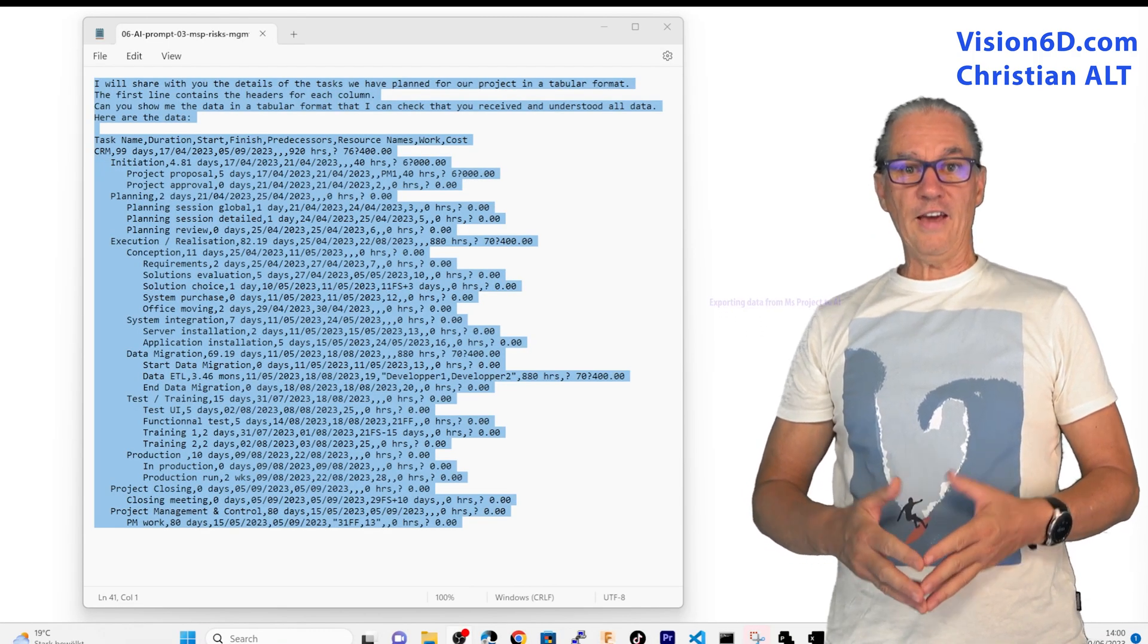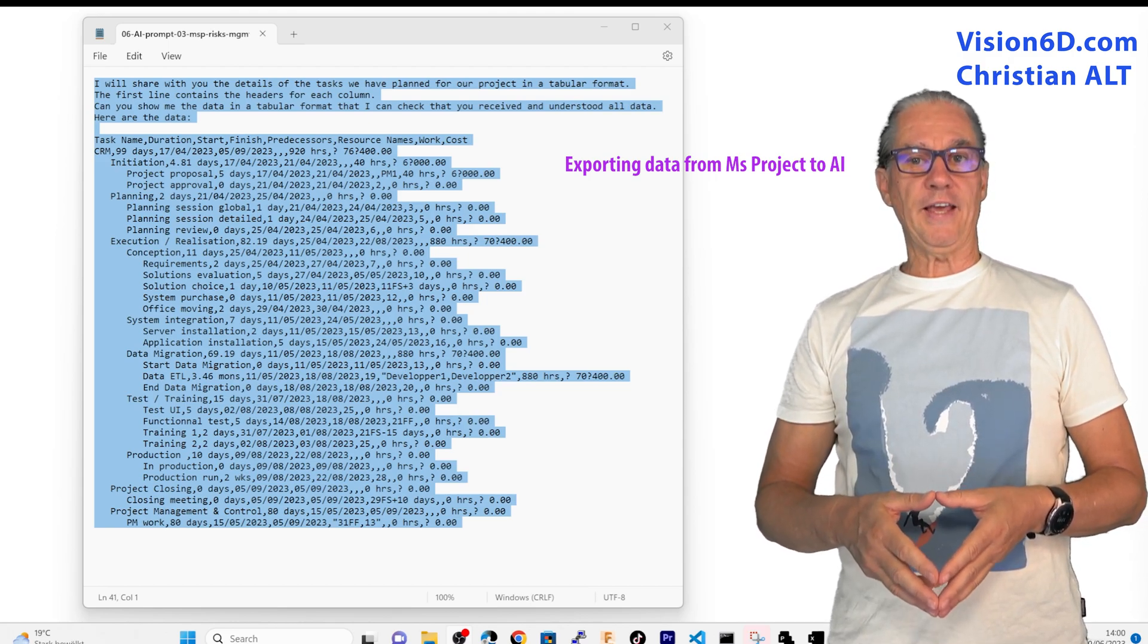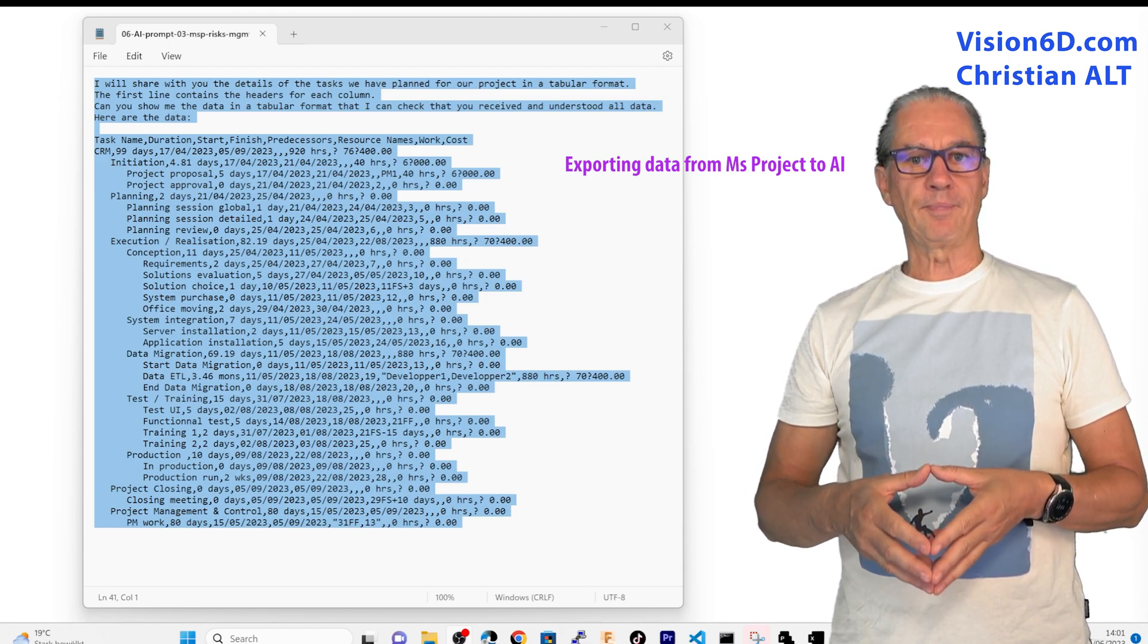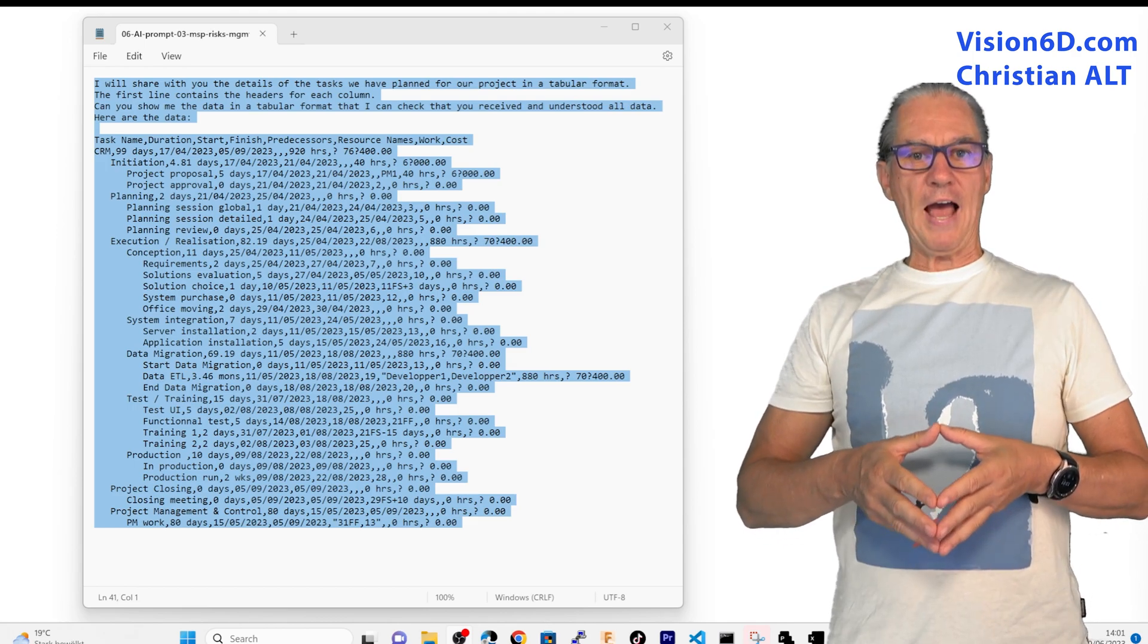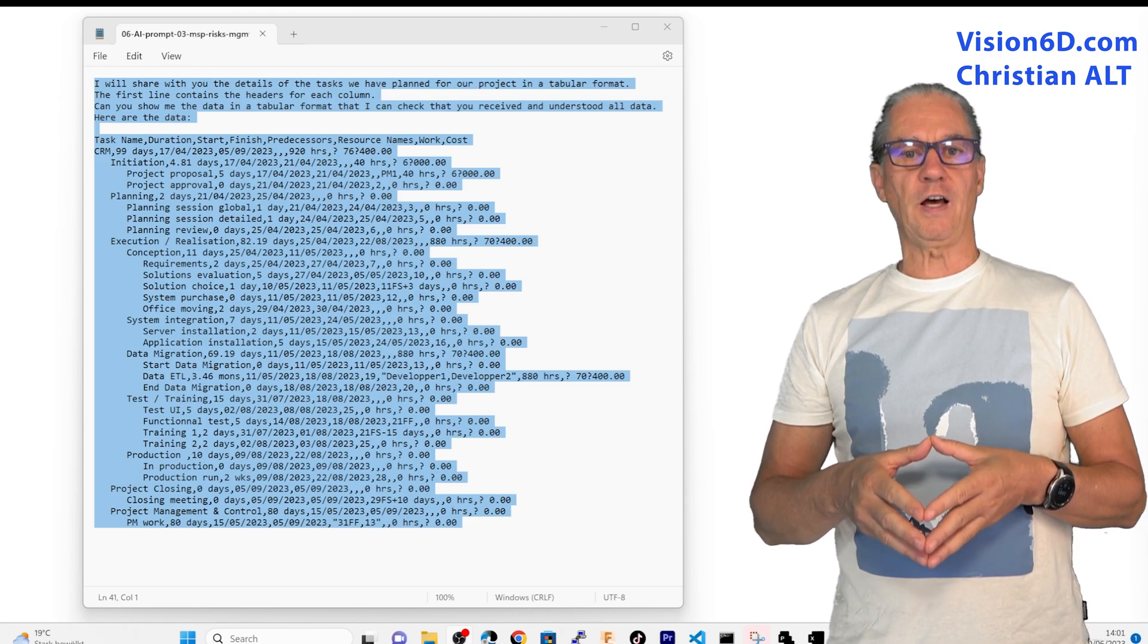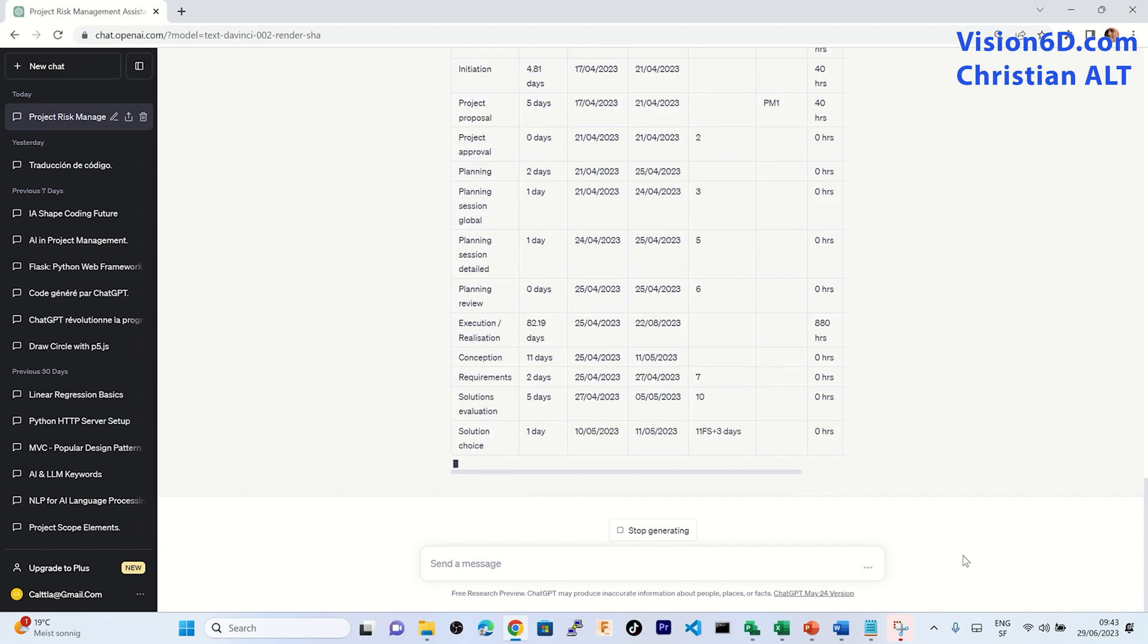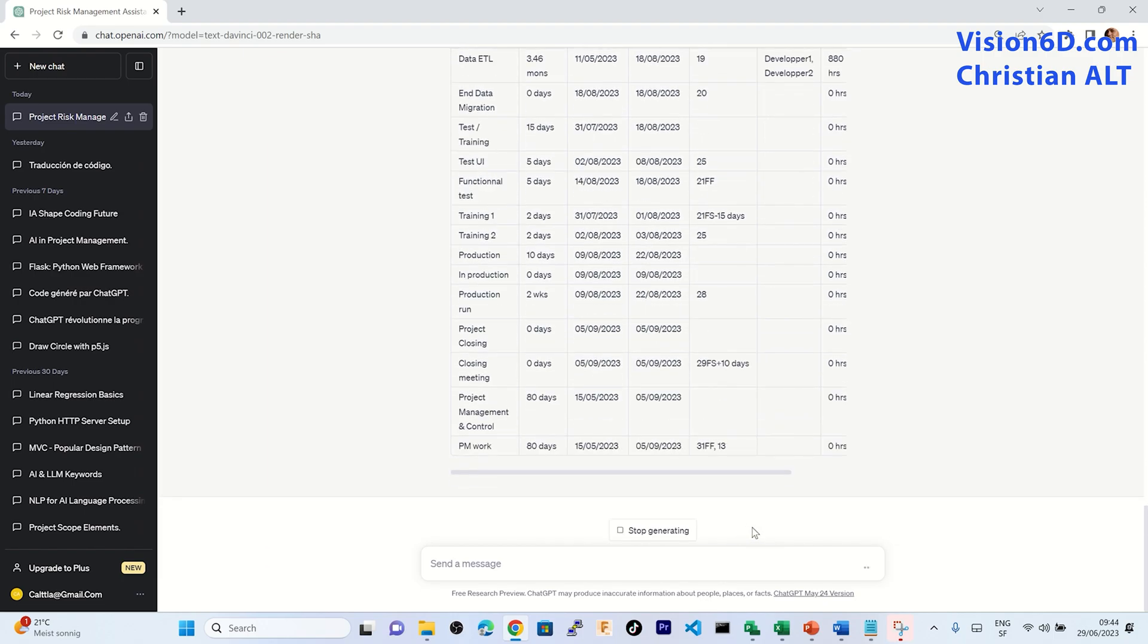I have extracted from MS Project all the tasks and I copy pasted this in Excel. From there, I exported it to a CSV file and it's this CSV file that I have opened under notepad and I've added my questions that I want to transfer in the prompt. What I'm asking from ChatGPT is to understand the different tasks. I'm telling it that the first line are the headers of each column and then I ask it to restitute me the complete data in a table format. In that way, I'm checking that the AI understood the content of my project.